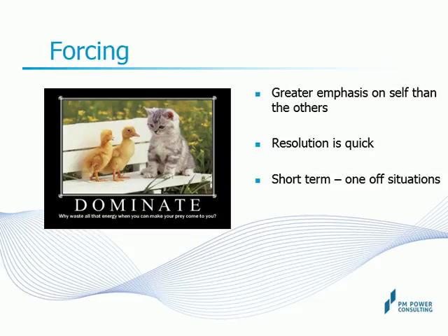A simple example: let's say there is a critical deliverable to the customer next month, and one of your key resources applies for a 3-week vacation for his honeymoon in the period leading up to the release. How would you resolve it? It's a tough one, isn't it? You're likely to force your priority and delay the vacation.